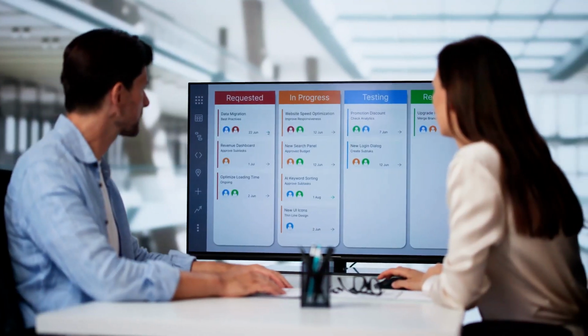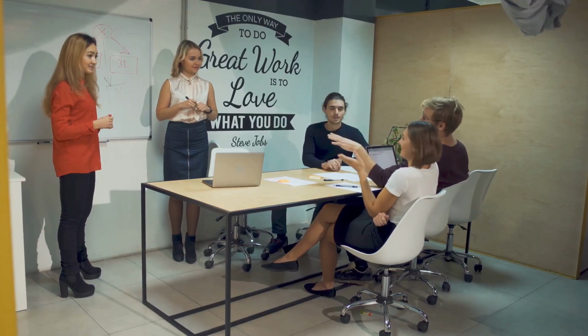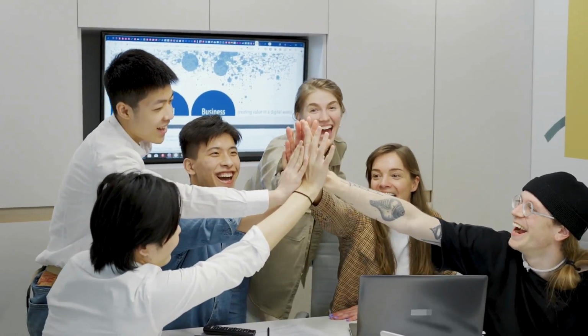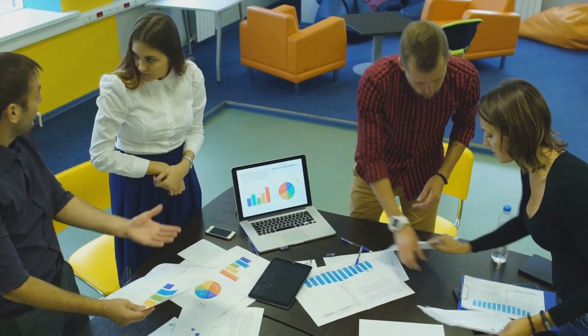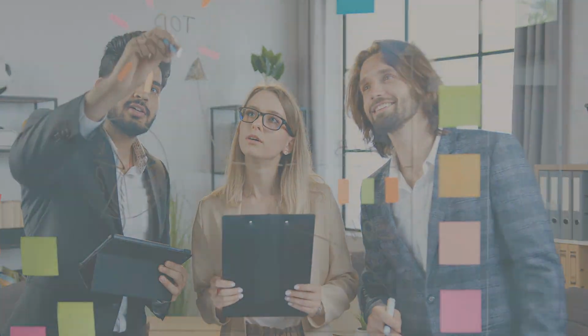Each card contains audit details, responsible parties, due dates, and attached documents. A daily 10-minute stand-up ensures issues are flagged early and nothing gets lost. Over time, audit closeout time is cut in half. Trends and bottlenecks lead to targeted process improvements. This is TQM in action, visual systems driving data-informed decision-making and continuous learning.